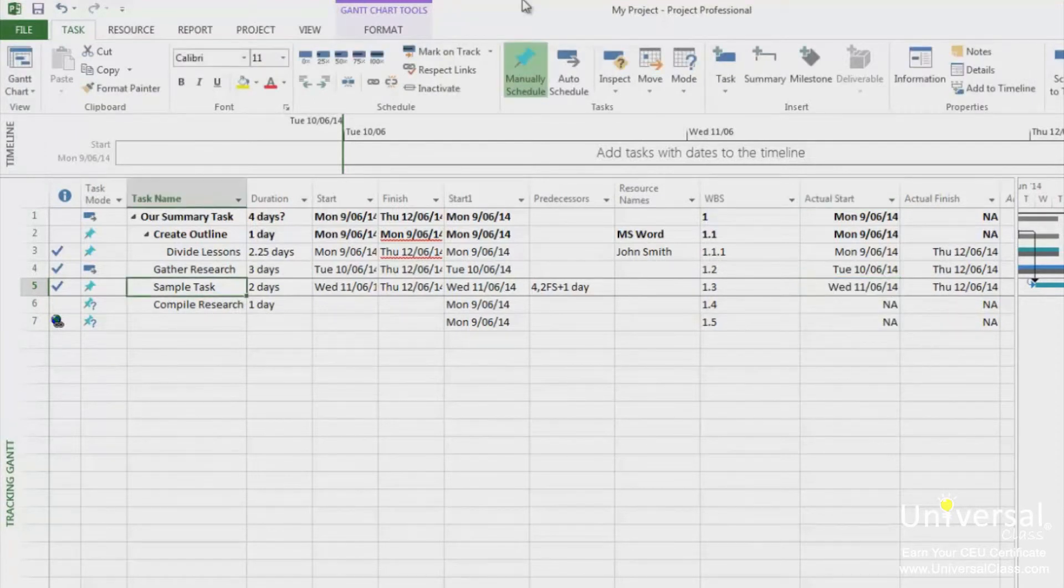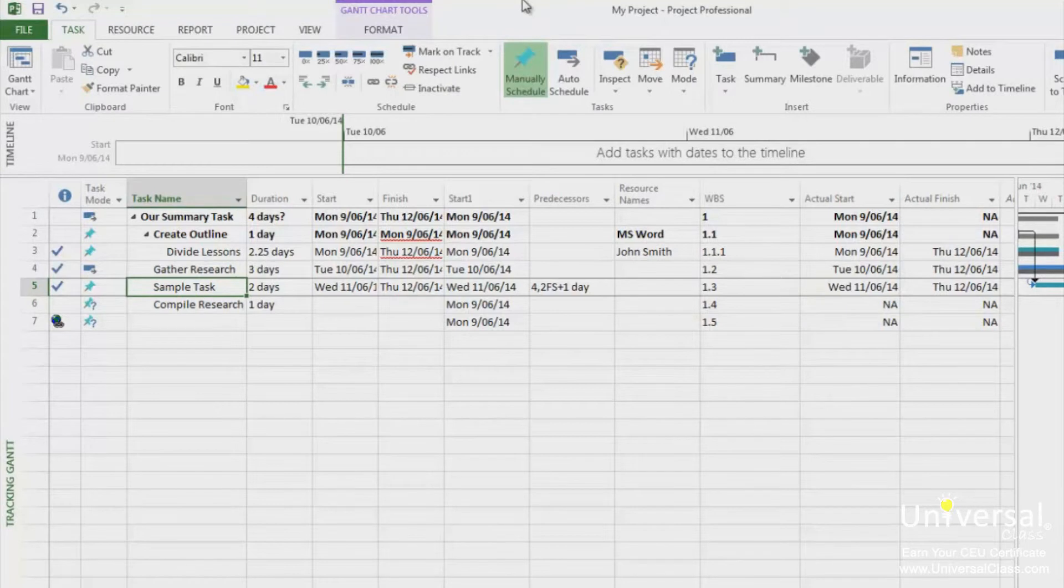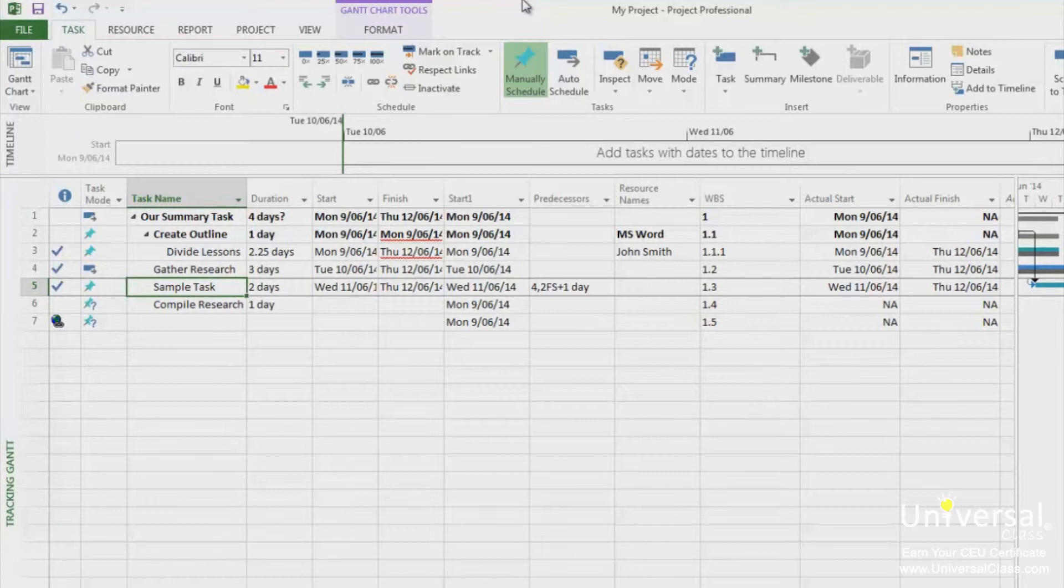It's going to be important for you to be able to tell how many hours a resource spends on the project. This is especially important if you have employees or contractors working on the project. Here's how to enter resource hours. Go to the Task Usage view.